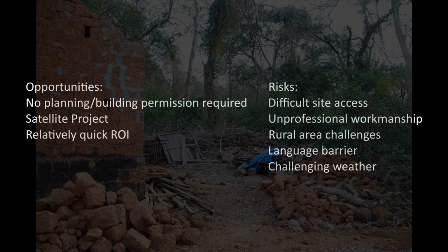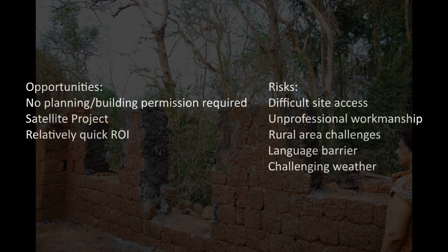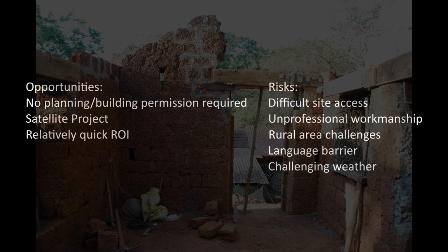So unfortunately, we are working with very tight parameters on site and extreme changes in elevation that make it impossible to get any heavy mechanical equipment. Almost everything has to be done by hand, including transportation of all of the materials. And this complicates things because you are inviting more risk in terms of the potential for delays and also working with a lot more uncertainty with the labor over here, which brings me into points 2 till 4.